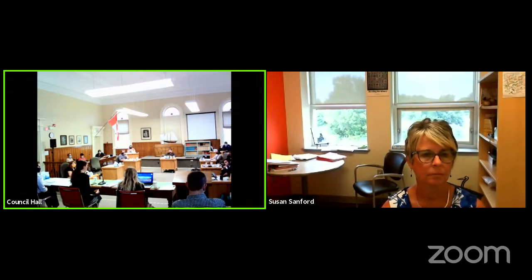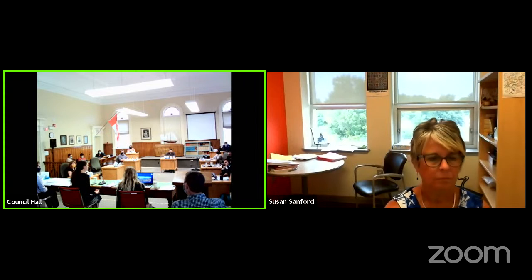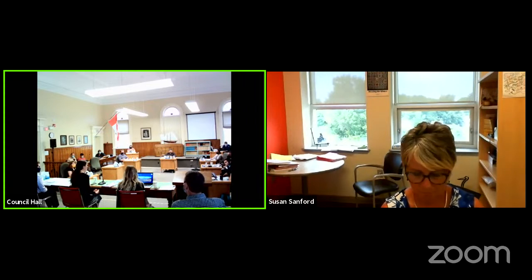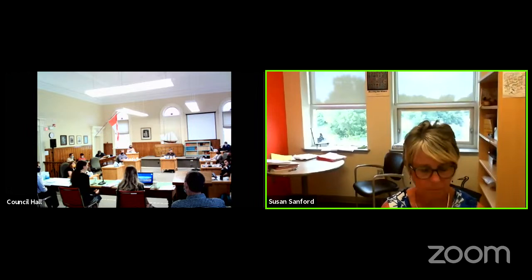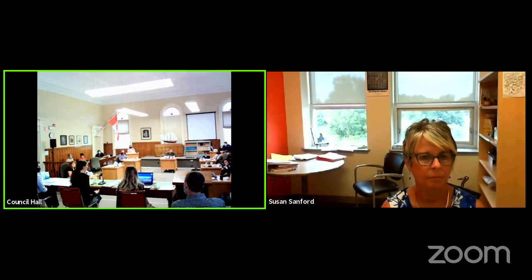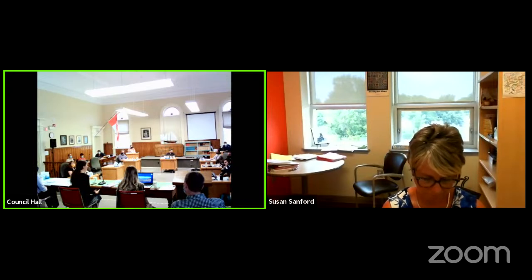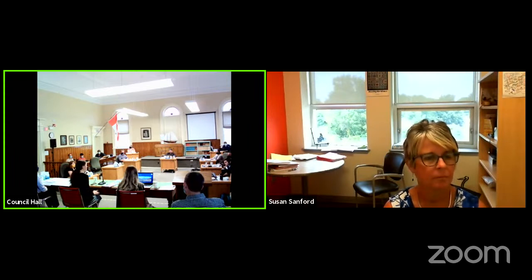So during the regulatory review, we tried to identify all the possible regulators that could be involved and what sorts of applications would be needed for them. But the regulator does have the ability to approve or not approve a project. So the better the information that's provided to them in the regulatory package, the easier it is to get an approval from them. And also starting that regulatory consultation process as early as possible to identify any possible places where there could be an objection is recommended.